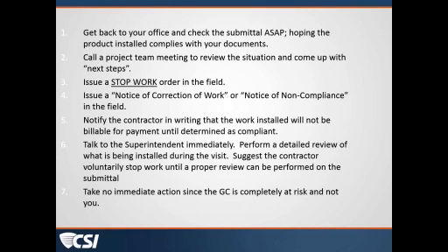And often we are able to, for example, have submittal schedules within the documents that are bid. And if we don't, as a specifier, we often require the general contractor to submit those as some of the early administrative paperwork.